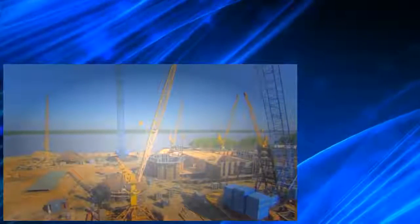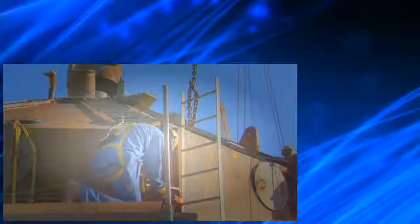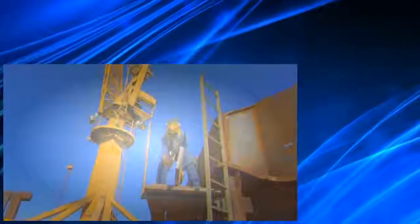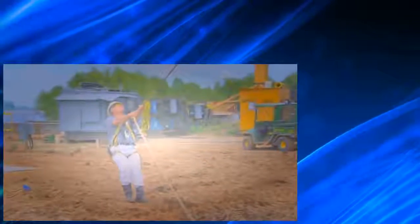Tarzan rigs can earn $100,000 a day. But as long as the rig is unfinished, it isn't making money, it's costing money. The first Tarzan came in at $110 million, the cost of two Boeing 737s. Bodie's under orders to nail this one for $20 million less.